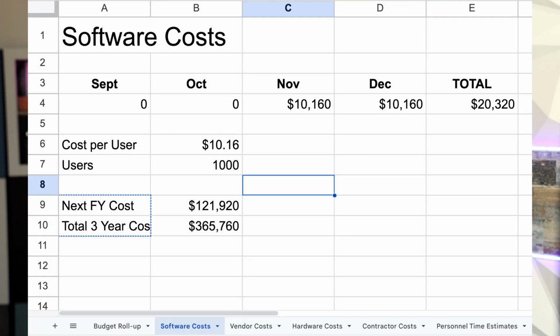And that's what it's going to cost this fiscal year. When you talk to finance people, they're very interested in the fiscal year that something falls into. So that $366,000 becomes $20,000 this year. And if you look lower on the sheet, it's very easy to calculate what the next fiscal year cost is going to be. So just a little over $120,000 next fiscal year.